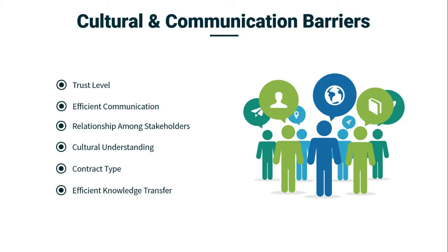In their research, Ranasinghe and Pereira have defined six most critical success factors in distributed teams, which are number one, trust, number two, efficient communication, number three, cultural understanding, number four, relationship between client and vendor, number five, contract type, and number six, efficient knowledge transfer.